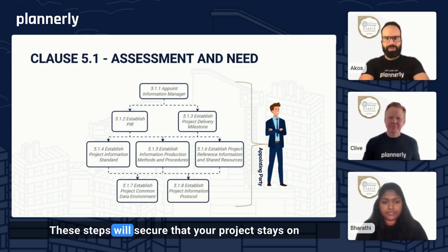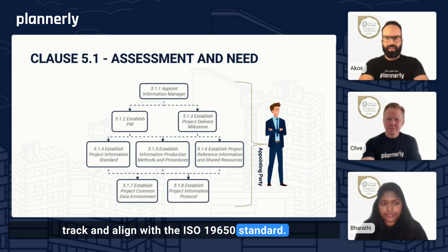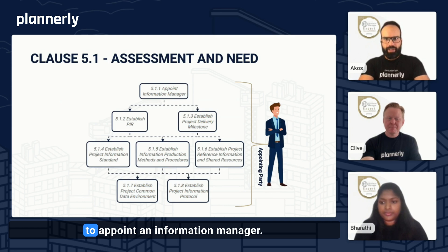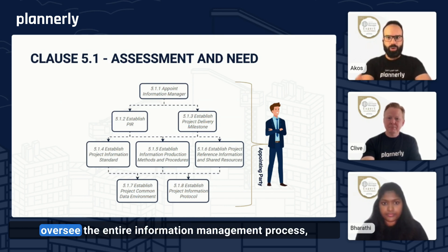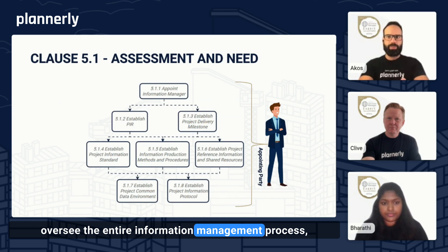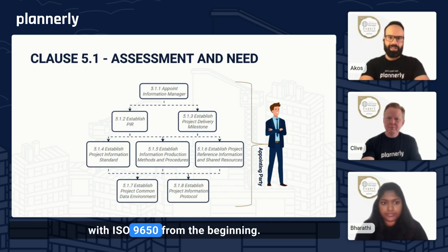These steps secure that your project stays on track and aligns with the ISO 19650 standard. First of all, you need to appoint an information manager. This person will oversee the entire information management process, making sure everything complies with ISO 19650 from the beginning.